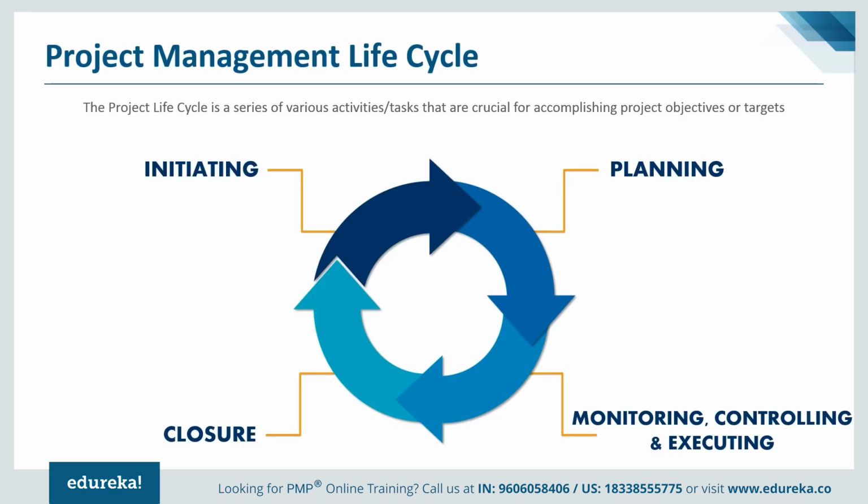The word baseline means that these are plans approved by the management, and after the baselines are done, any changes to that plan will have to follow a change request process to the management. The project manager is an authorized person who can carry out those changes, but once the baselines are signed, the authority of change goes from the project manager to the senior management. The body responsible for responding to change requests is called the change control board, in short, the CCB.